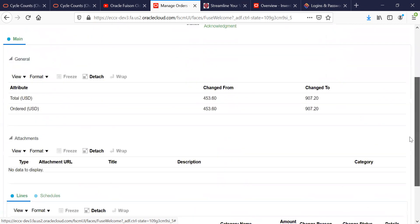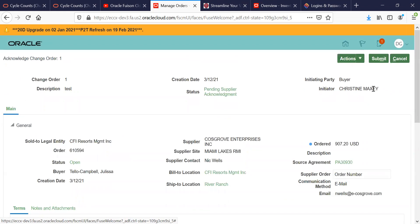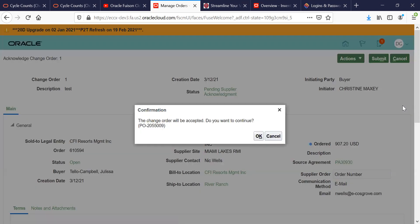You're going to go back up and you're going to hit Accept if you're accepting the changes. Once you have accepted the changes, then you're going to hit the Submit button and it's going to ask you, the change order will be accepted. Do you want to continue? You're going to hit Yes.